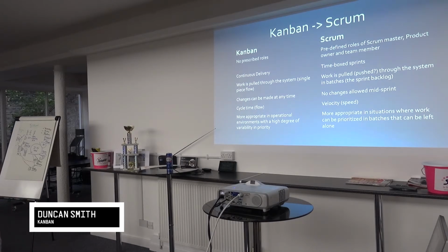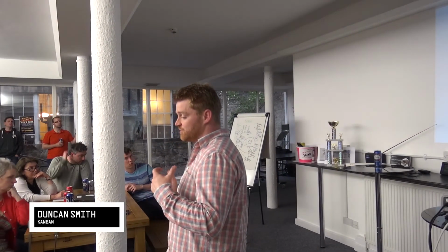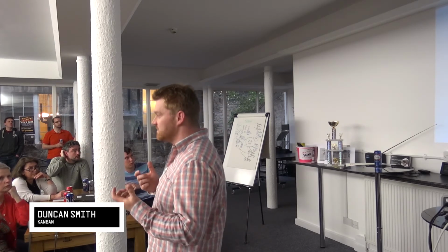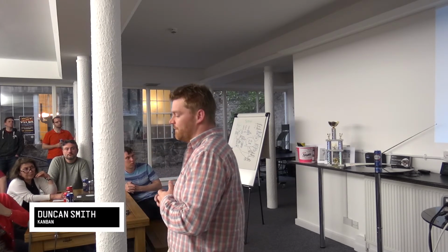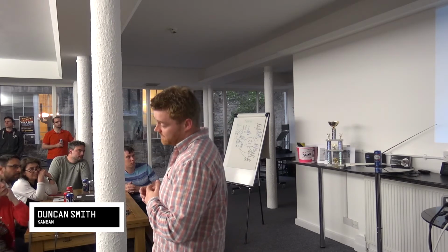If there's something you want to do to deliver stuff quickly, where you want to get up to speed very quickly, there's no roles, responsibilities, we don't make any assertions of having a product owner or a scrum master, organisational changes, none of that's prescribed inside Kanban, which makes it a very quick and easy system to take on board. And because you're just measuring flow rather than velocity, again, you can estimate, it is common in there, but you're less interested in that kind of burn down chart approach. You're much more interested in throughput, cycle time, and beginning to understand where your bottlenecks are.